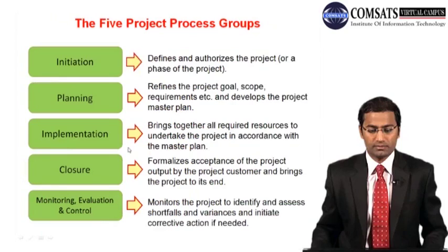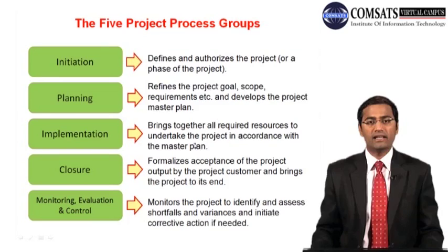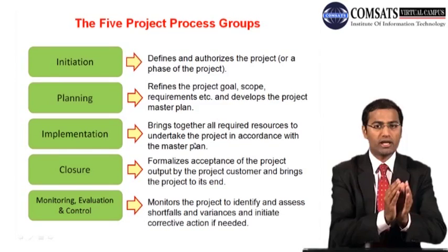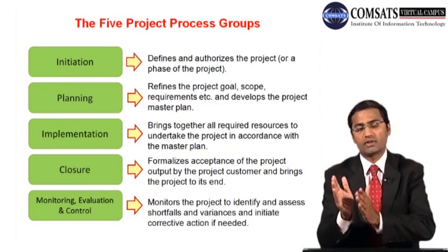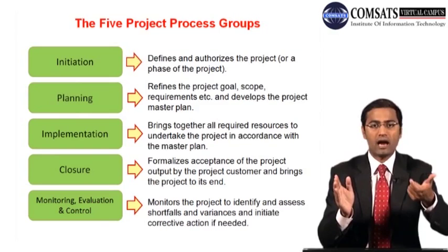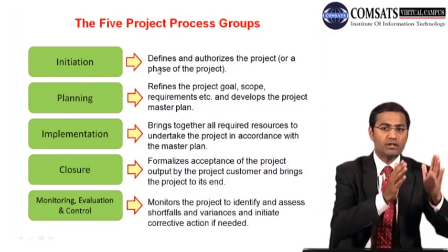So the five project process groups, a summary of that: initiation defines and authorizes the project or a phase of the project. Now, when it comes to a simple project, you are talking about a project. And when you are talking about a complex project, you divide the project into phases. So first phase, second phase, third phase, or fourth phase. Each phase is then handled as a sub-project, and a complete team is available for that particular phase. So you close every phase just like you close the project, and you start the phase just like you start the project.